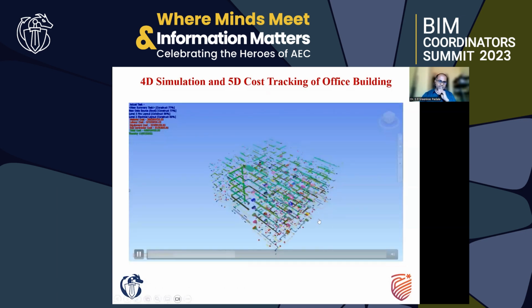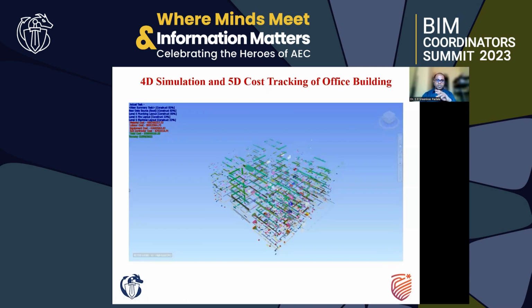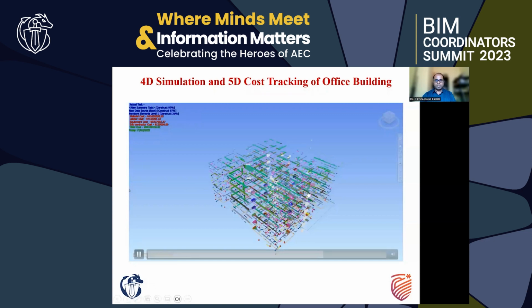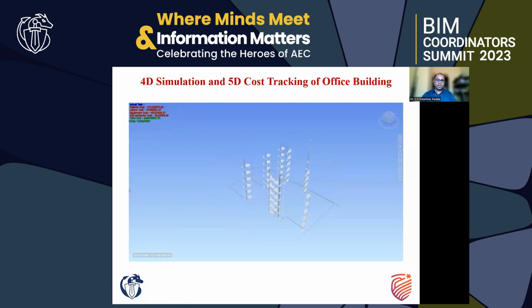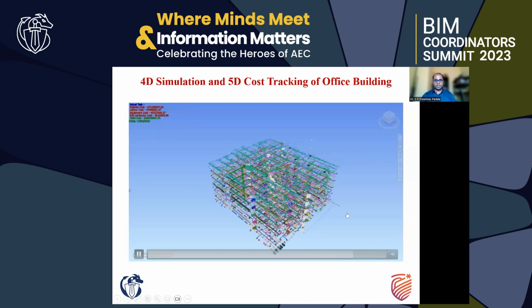So you can stop at any stage and check what the time and cost progress should be. You can also check at what stage the project should be completed. And you can also compare with as-built. As the project was moving on, I took the actual data from the site, which is manually calculated data. Then accordingly, I remodeled this 4D 5D model.